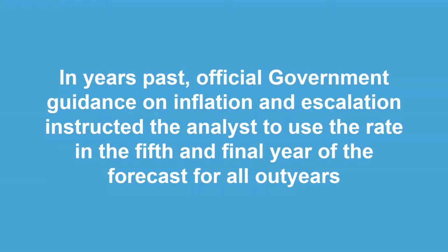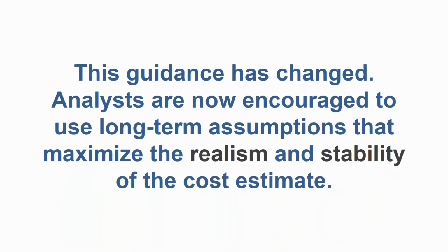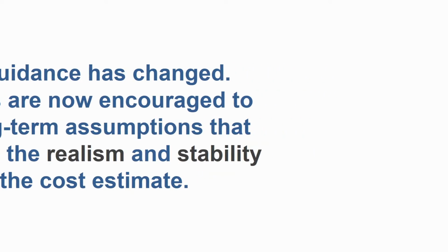In years past, official government guidance on inflation and escalation instructed the analysts to use the rate in the fifth and final year of the forecast for all out years. This guidance has changed. Analysts are now encouraged to use long-term assumptions that maximize the realism and stability of the cost estimate.